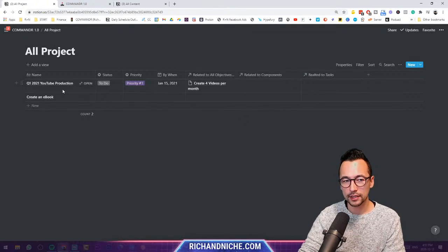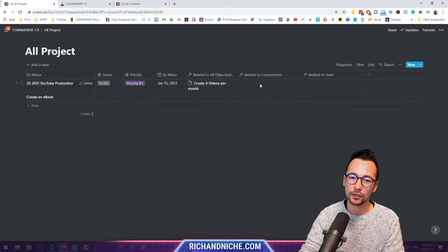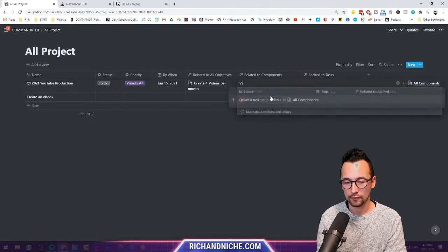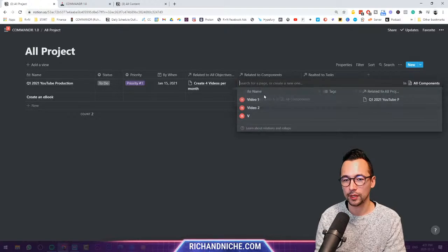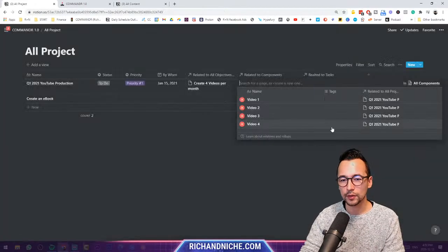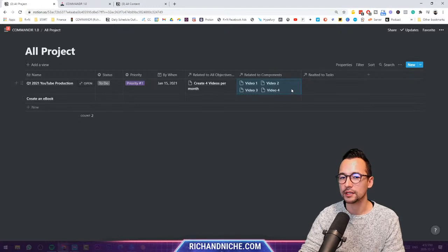If my project is to develop all the YouTube production for the quarter, and the objective is to do 4 a month, what does that tell you? 12 videos. I would say all of those videos are their own components. So what you could start doing is video 1, video 2, video 3, video 4. Okay? Why would I do it as simple as that? Because that way I can be sure I'm going to hit my objective really clearly. Although the project is a bit vague because it contains so many elements, it's very clear that my components will lead to my objectives, because the next thing I could do is go into the components and set due dates that are commensurate with creating 4 videos per month.